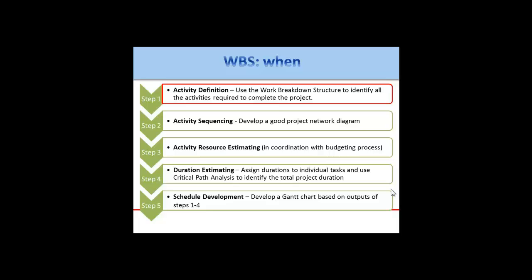So, and we can see in the slide where the work breakdown structure comes. It's here at the beginning, and I think it's worth mentioning that if you've got a good work breakdown structure, then many of your other subsequent plans, a monitoring plan, for example, a communications plan, even a recruitment plan, 90% of it has been done for you. So it's a useful tool, it's helpful, and it's worth mentioning, I think, that in every PMD Pro course that I have seen, this is one of the tools that people always flag up as being really helpful.